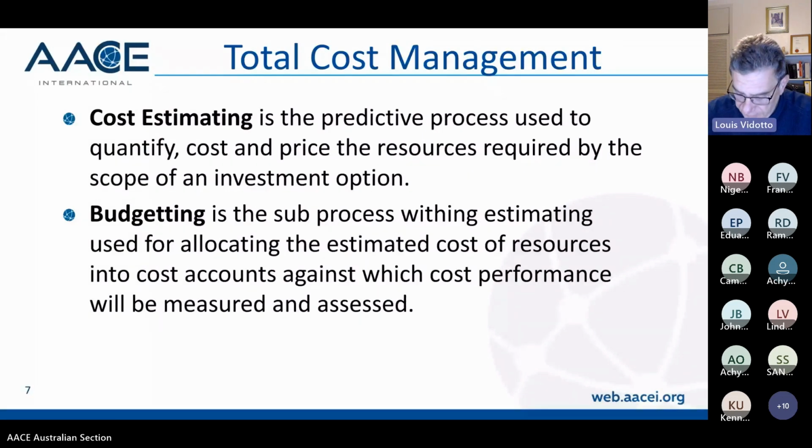And so the cost estimating, total cost management talks about cost estimating, and they call it the predictive process used to quantify cost and price the resources required by the scope of an investment option. The resources required are quantities, labour, materials and equipment, and time.